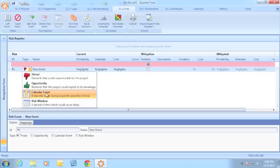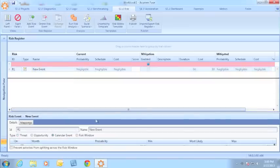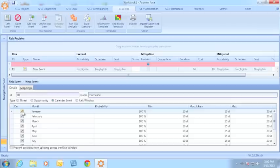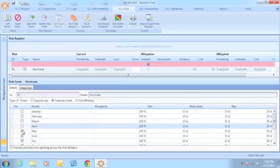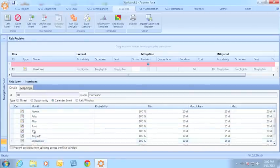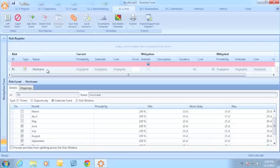Let's look at calendar events first. A calendar event could be something like a hurricane season. If we knew that for this project, hurricane season was from the month of June through the month of November, I can define that time period. Then I have the option to map my hurricane risk event to the areas of the schedule where it might impact.